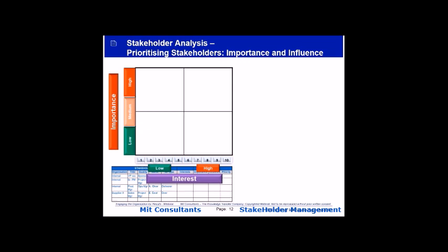If you meet people, if you have interviews, you can understand where they're coming from, or you might well say this particular project has a major impact on, shall we say, the way the organization functions as a manufacturing, for example. So a certain stakeholder should be interested high enough here, or if there are very tight financial or it's a CapEx kind of program, then I'm sure the financial people are very highly interested in how you're going to be spending the funds. So by doing so, in this 2x2, one can then plot where each of the stakeholders